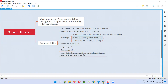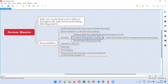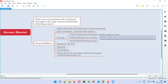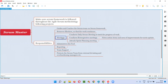The Scrum Master conducts the retrospective meeting and also makes a note of all the action items that the team discussed during that meeting — such as areas of improvement for the next sprint. All this feedback and action item notes will be taken by the Scrum Master.